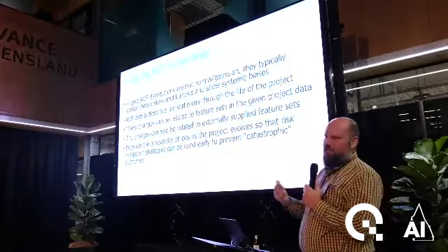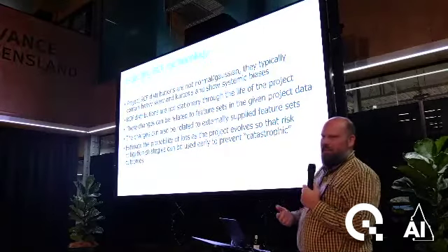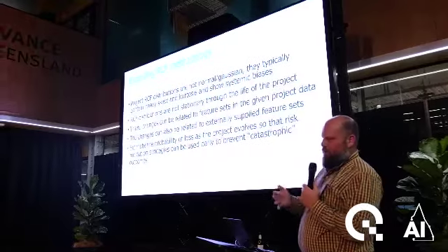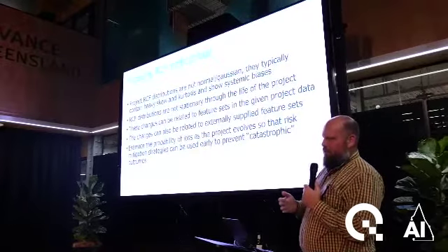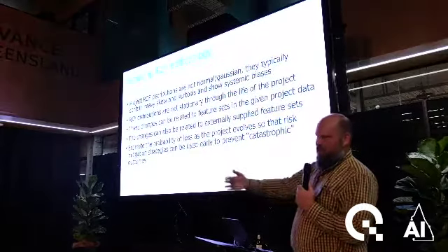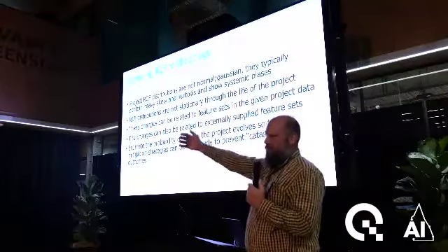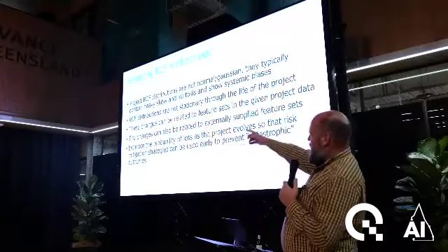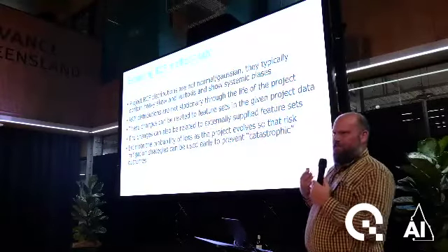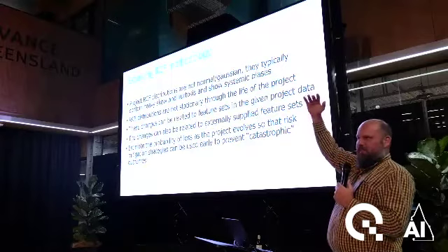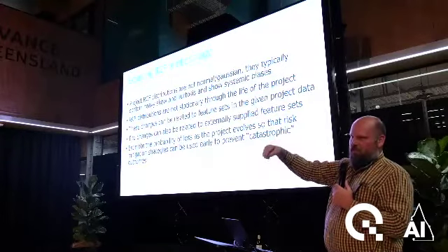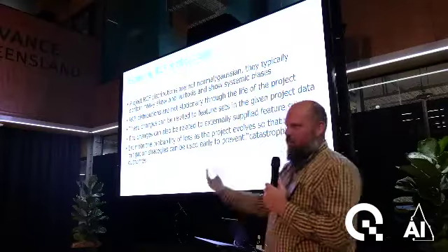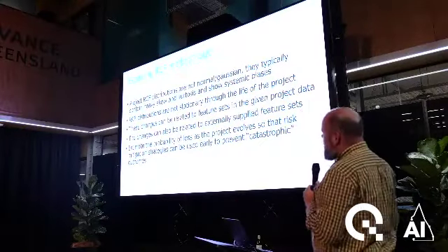So you can imagine it's almost the same as if you've got an investment. You put $1,000 in some mutual fund. How's the value of that mutual fund going to diffuse through time, in 1 month, 6 months or a year? The further out in time you go, the wider the envelope's going to be. But this works backwards, right? At the start of a project there's an envelope, this is the risk. But as you get towards the end of a project, when the project's finished, there should be no more risk. It's closed out, everything's been paid, we've gotten our checks, and we walk off.